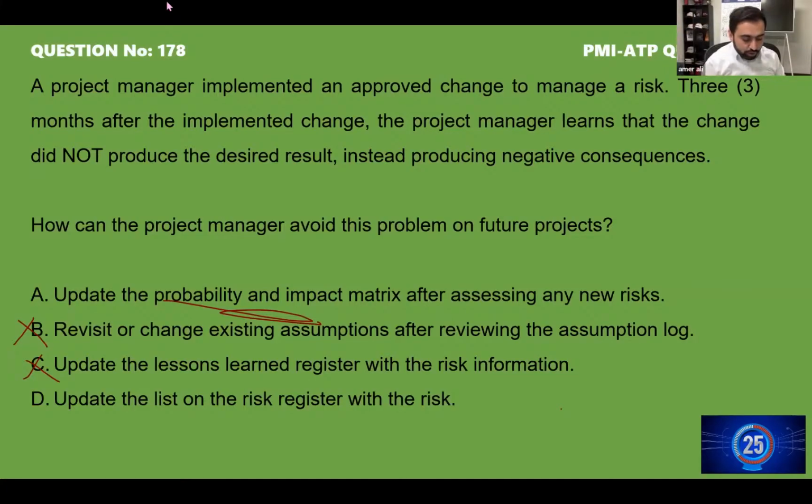Everyone open the page number where how to handle an issue is written. Step number 1: something unexpected has happened that was not planned. It should be recorded in the issue log. Conduct a root cause analysis of why the issue was not identified. So now this problem was not identified, and it has become an issue. Everyone agrees? We should have done the root cause analysis. Yes, I agree. That's how we should have resolved it.